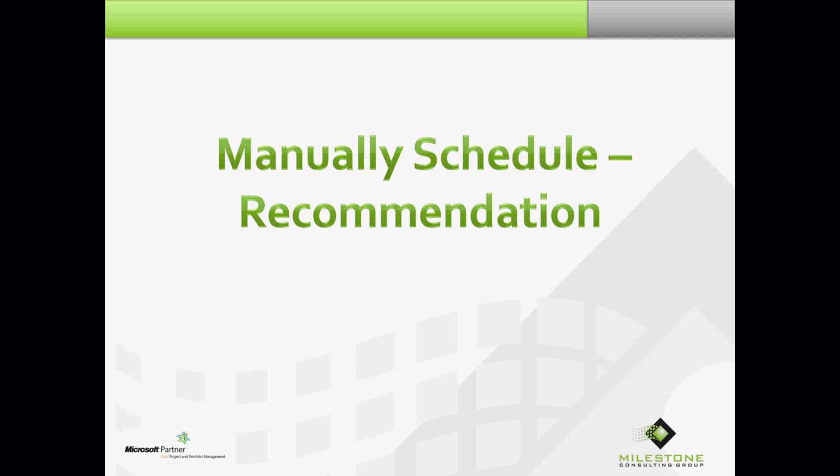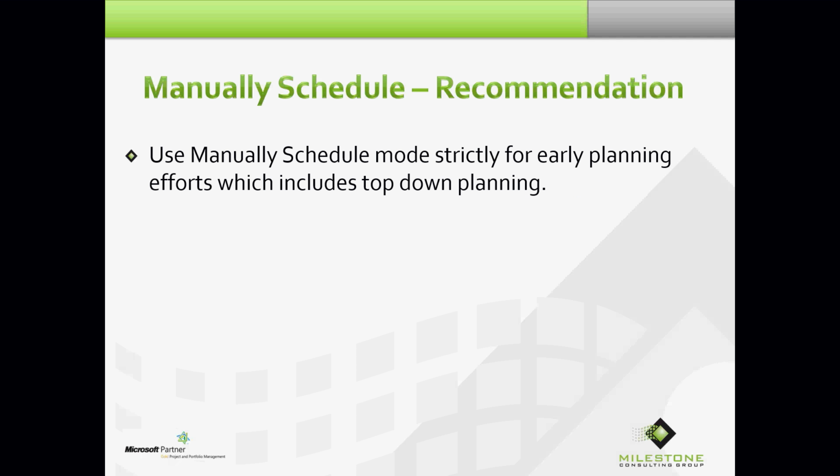So, at a high level, we have a recommendation. Use manually scheduled mode strictly for early planning efforts, which includes top-down planning. That is our recommendation right there. If you said to me, Dan, when would you use manually scheduled mode? That would be it.